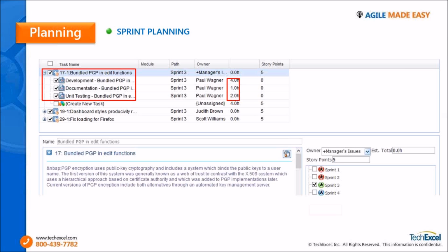So let's say the estimated total for all the tasks is about 80 hours or 160 hours or any number. Based on that, we could decide that these set of user stories and these set of tasks would take about two sprints or one sprint or this number of days.